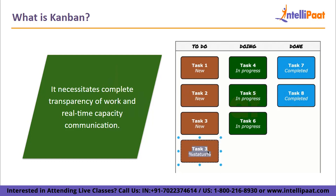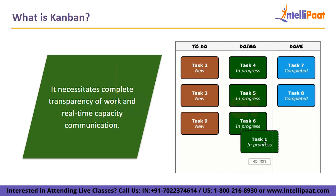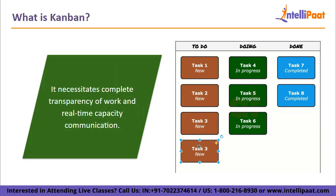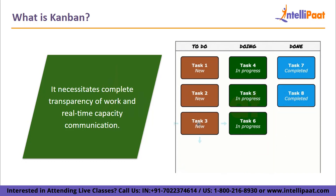The Product Owner is free to reprioritize work in the backlog without disturbing the team. The development team knows they are giving the business the greatest value possible as long as the Product Owner keeps the most crucial tasks at the top of the backlog. Therefore, the fixed-length iterations found in Scrum are not necessary. The individual differentiation is not always necessary when deciding between Kanban and Scrum because the two methodologies can coexist.